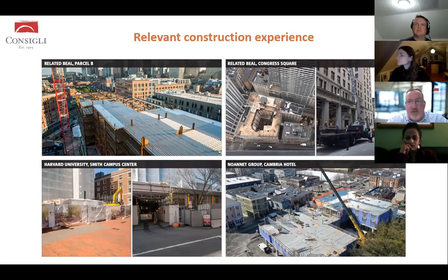So we will survey adjacent buildings as well. We'll hire a consultant to come in to do that, just to confirm the existing conditions of buildings. And then, as Adam said, we'll have monitors set up on site. We're not doing any blasting or anything like that. We don't anticipate any rock that we have to break. But obviously there will be some vibration just with compacting of soils.